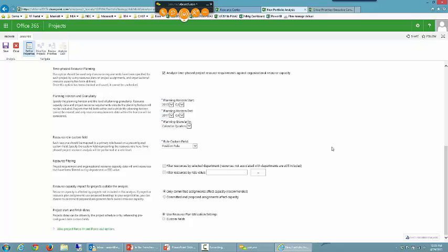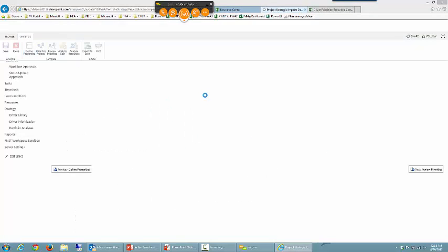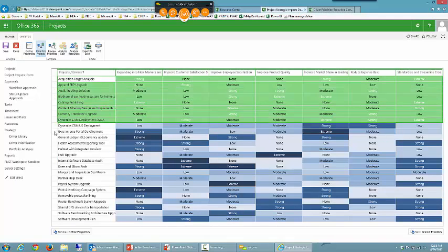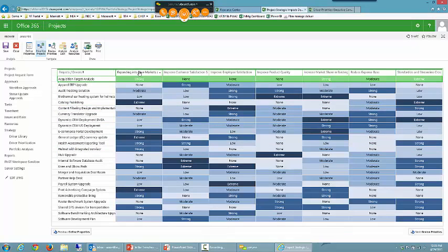Next thing I'm going to do is take a look at the prioritization of the projects themselves. So of the 25 projects that were selected, they're showing up on individual rows here. I can see what their scores were against the individual business drivers here. So this kind of gives me one last chance in analysis to put on my bogus detector. And if I see a project that's extreme all across the board, that doesn't mean that that's inaccurate or somebody's trying to game the system. But I'm certainly going to put that project under a pretty tight microscope before I proceed.